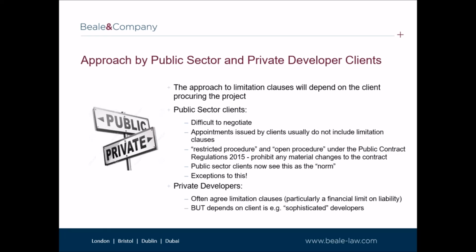This is commonly in the infrastructure sector and where projects are considered high risk. Some protection is offered by the client. In relation to private developer clients, in our experience, the majority of private developers will agree limitation and exclusion clauses, particularly financial limit and liability, as they recognise that consultants give great importance to such clauses. However, this usually depends on who the client is. For example, from our experience, some sophisticated developer clients often insist on no limitation and exclusion clauses.